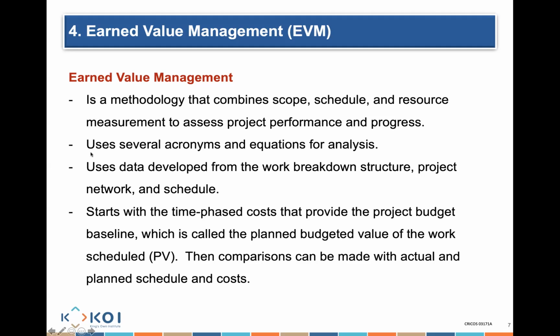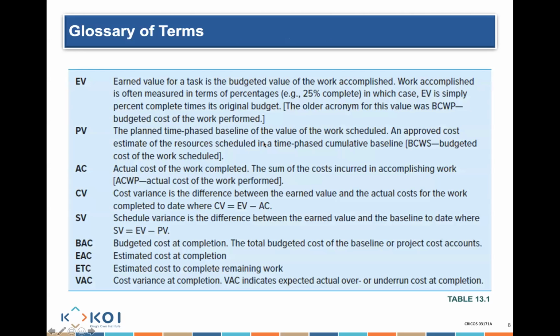These are the sort of things we need to really bear in mind. So I'm going to explain the keywords in simple words so that you guys will be able to understand them. Earned value means how much work have I actually earned? How much work have I actually completed? You would say, I have completed $20 worth of work. Great. So I have earned already $20 worth of work from the work that I've already completed. So that's what we call earned value.